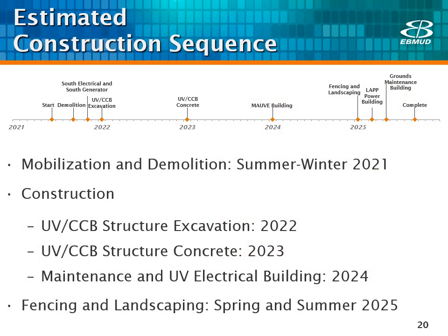At the top of the slide, you can see a construction timeline for the project. Project construction will take approximately 4.5 years. Work activities will overlap, with sometimes components in different parts of the water treatment plant being constructed at the same time. But also, heavy periods of construction will be interspersed with periods of less or little activity.